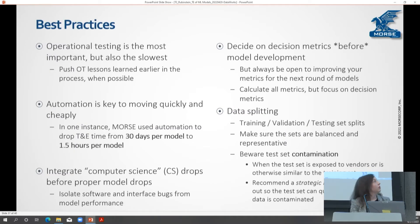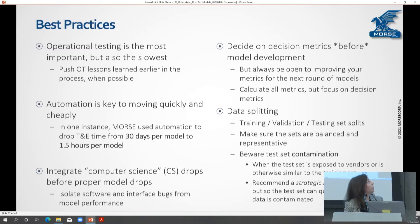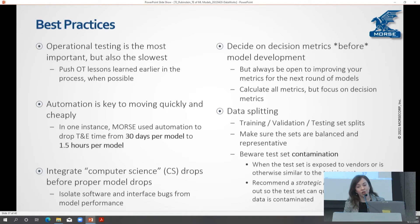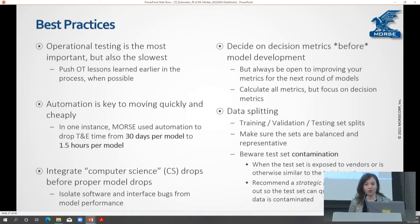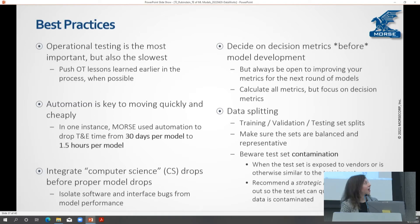I want to take a few minutes to talk about some best practices learned over time. Operational testing is the most important but it's the slowest — it's easy to push that off until the end, but that's not the best way of doing it. It's really better to do it as early in the process as you can, even if you have something that's not fully functional yet, just to start getting those lessons learned so you don't get too far down the rabbit hole in the wrong direction of something that's not going to be important to users.